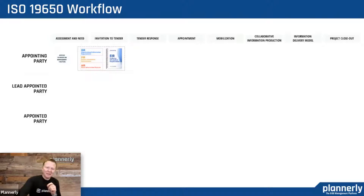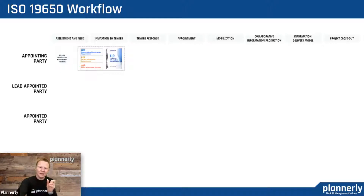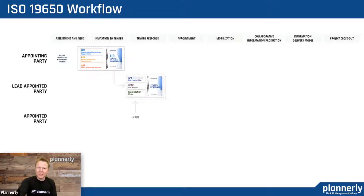Hopefully the appointing party has a group of documents that corresponds to an invitation to tender — this is the bidding process. Those documents combine into the exchange information requirements, from which we then get responses from the prospective lead appointed party.